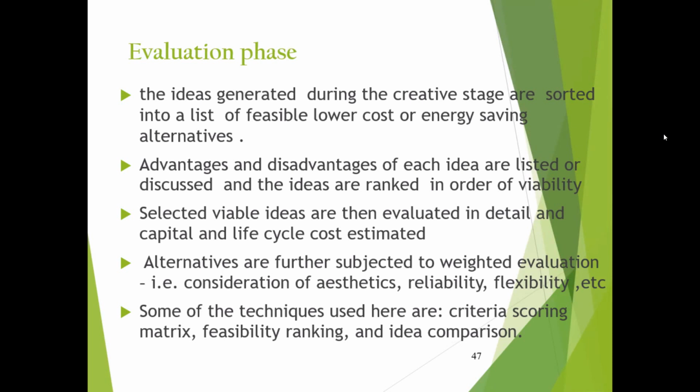Then the evaluation phase. In the evaluation phase, we have to evaluate all the ideas generated in the creative phase by the value engineering team. The ideas generated during the creative stage are sorted into a list of feasible, low cost or energy saving alternatives, right? So we sort them.